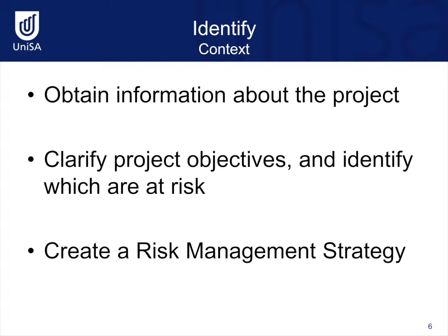When identifying risks, we first need to think about the context of the project. What is the project that we are working on? What are the objectives of the project, and which of those objectives are at risk? We also need to create a risk management strategy. The risk management strategy is a how-to document. It explains how risk will be managed throughout the project and who is responsible for managing each risk.